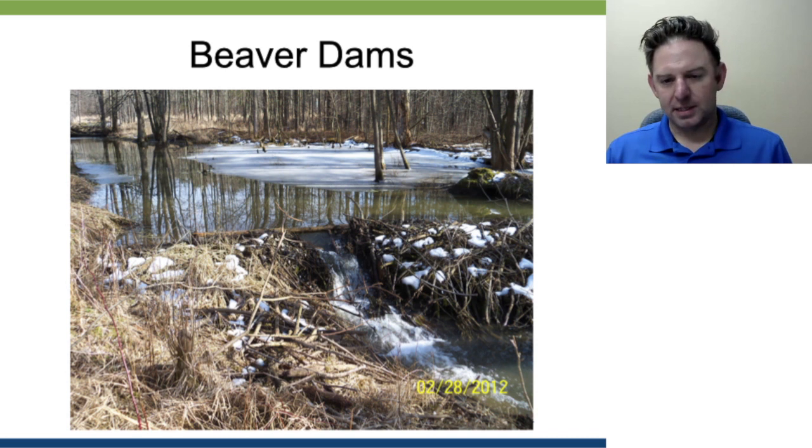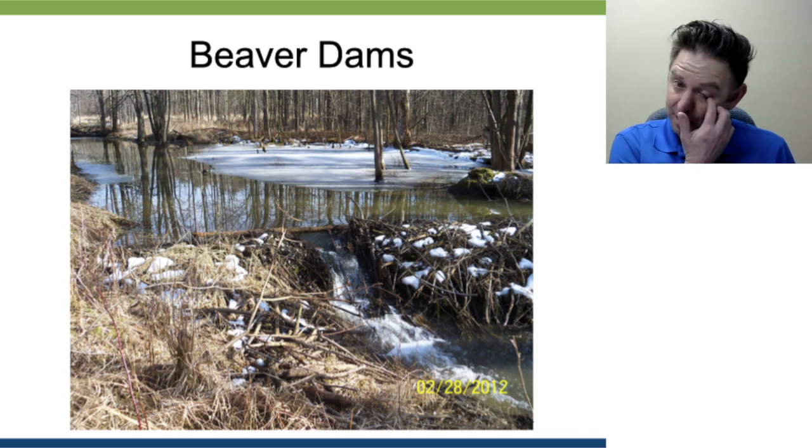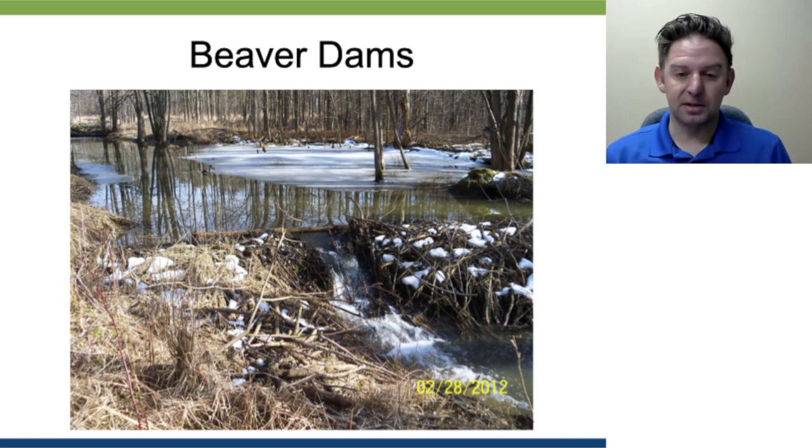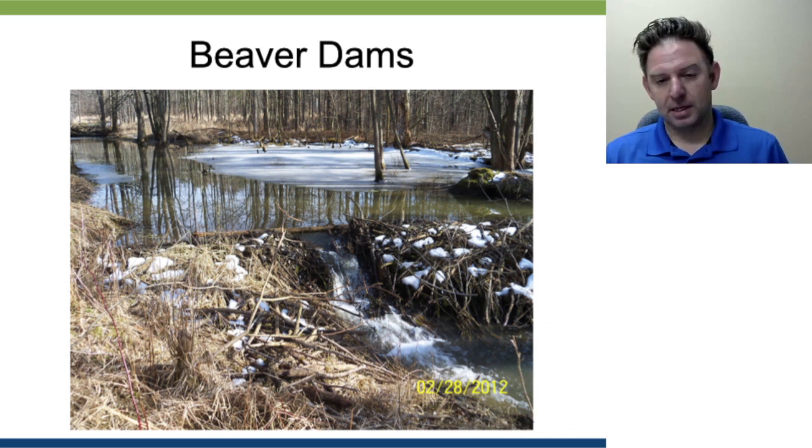One of the things that we often promote in discussion with our drainage superintendents in our watershed is, when you have a series of 3, 4, 5 dams, do the usual lowering, but also keep the bottom 1 or 2 dams intact and leave those till the end, because those become really efficient sediment traps. Then as you remove that last dam, you can remove the sediment at the same time. It just avoids continually dumping sediment downstream as you work your way up through the beaver dams.